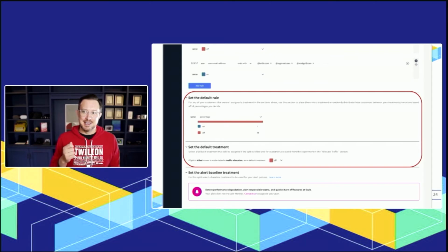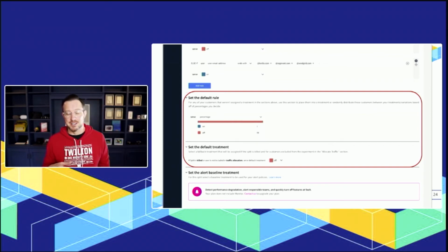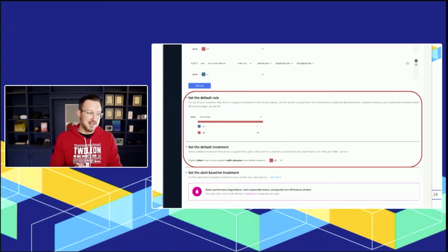And so this is allowing me to say, all right, service is staying up. There's not a massive disconnect in how people are interacting with the product, and then also allows me to take the feedback that I'm getting from customers and consume it. If I open it up to 50% right out of the gate, I wouldn't be able to manage all of that, and I'd be running around like a crazy man.